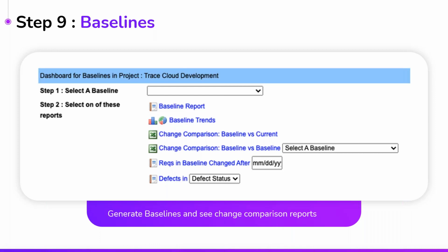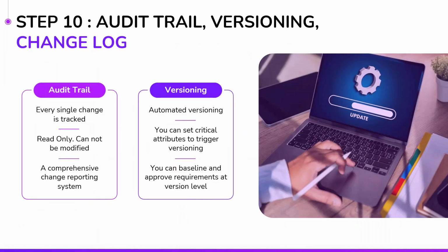So you want to use a system that gives you that flexibility, because quite often, I'm sure you've been in these conversations where the client or the vendor is saying, well, why have the dates changed, or what caused the delay in the project, or how can we avoid this in the future? And then you need to be able to compare and say, instead of it being a he said, she said, you can pull out a baseline report and say, this is what we agreed to, and this is the delta since agreement, therefore there is a cost to it.